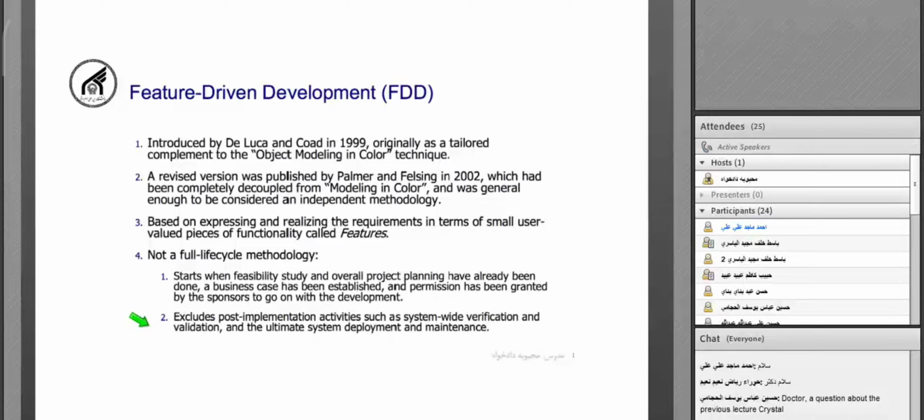The size in Crystal is just about the people that are involved. Okay, so the level of the people involved are very different. For example, we have 6 people, and after that we have 20 people, and after that we have 40 people. So the numbers are very different. We don't have 6 people and then 8 people. So you're going to estimate the number of people that are involved. If you estimate the number of people that are involved are less than 10 people, then you need to deploy the Crystal Clear.